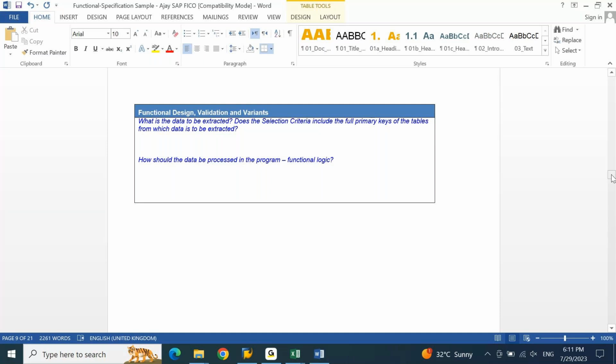Your client will tell, yes, as discussed, we are aligned with us. So after this email confirmation, if any change that your client is proposing, if any corrections that your client is telling, they are on the official note. They say that I want to change this, I want to change this. Yes, we will change it. Then you will put your remarks. We will consider these corrections. However, to make these corrections into consideration, we will have to increase our effort to 3 days. The effort estimation will go up or will be increased by 3 working days. Kindly approve, because all the developments are cost effective, because you will be charging your client for this development.